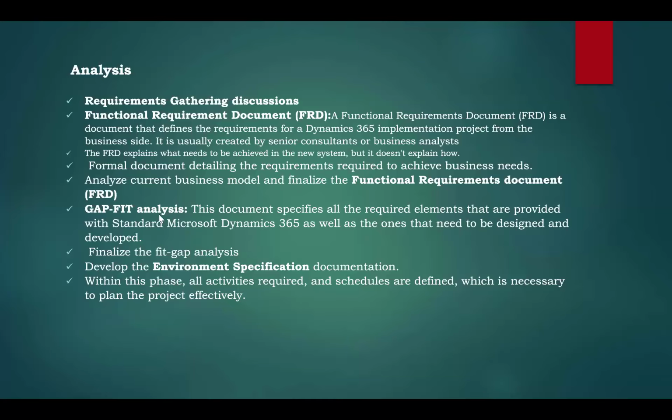And within this gap fit analysis, you are going to eliminate which are not necessary, right? And you are going to convert them into fit or gap, which is mandatory. All these discussions will be finalized in this gap fit analysis. Followed by that, from a technical point of view, there are different types of environments that the customer wants to have, and we are going to suggest them. Obviously, UAT will be there, dev environment and SIT. These are for testing purposes, and dev environment is for the technical team. UAT and SIT are for the functional team.